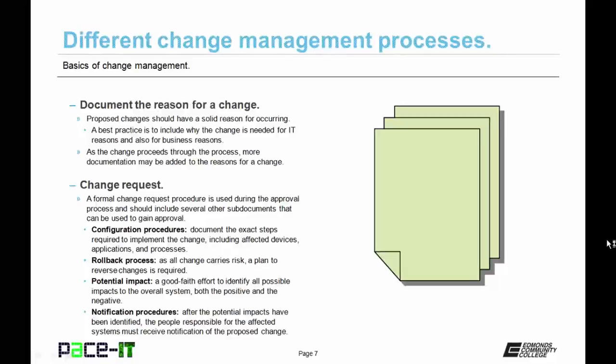Let's talk about the change request. A formal change request procedure is used during the approval process and should include several other sub-documents that can be used to gain approval. One of those documents is the configuration procedures document. These document the exact steps required to implement the change, including affected devices, applications, and processes.